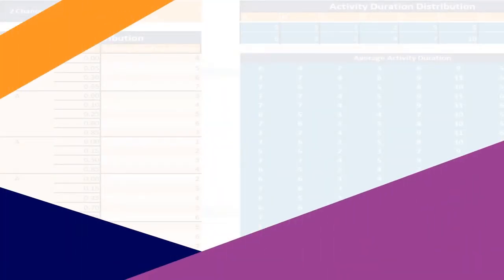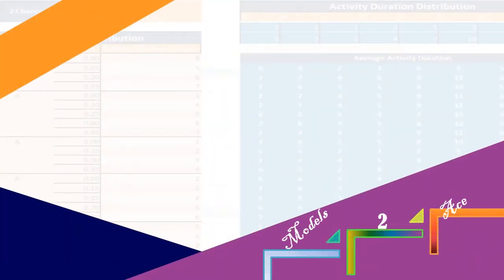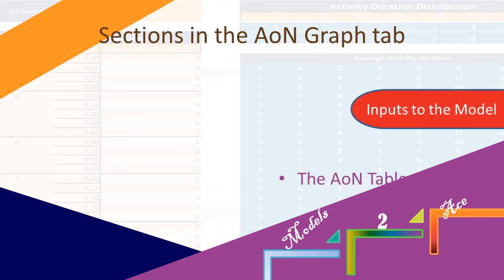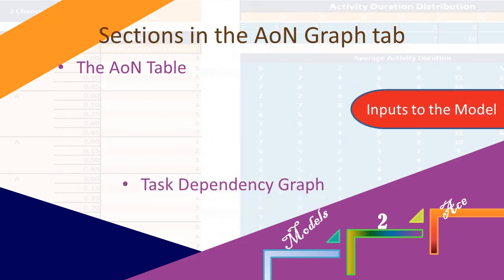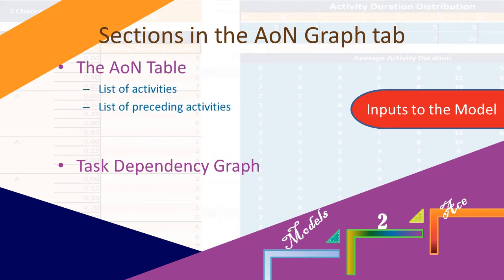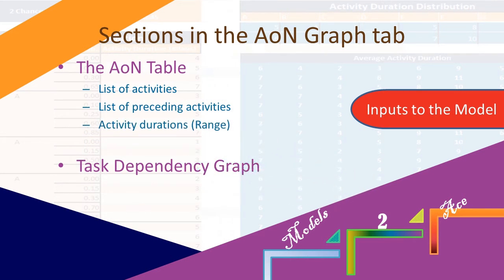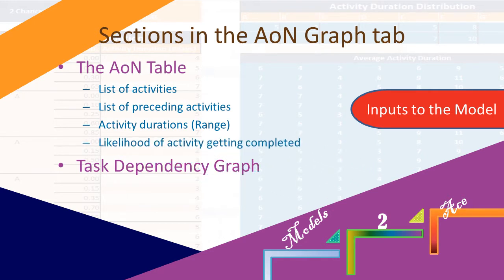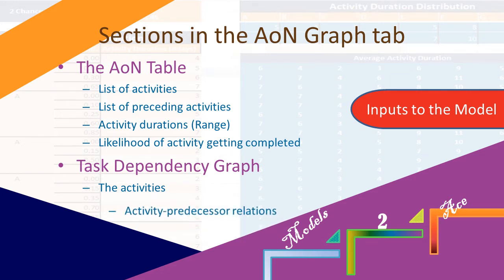The first tab titled AON Graph consists of the table to the left and the directed graph to the right. The table named AON table lists out the eight activities in the project along with data on those activities. This data is the input to the model. The project is visually depicted in the graph to the right, which represents activities on its nodes connected to predecessors by directed arrows.